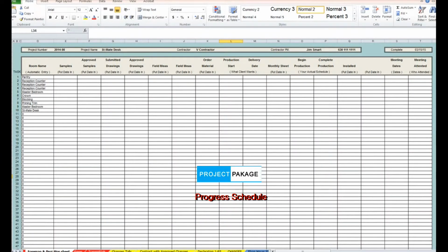Another sheet was a sheet that everybody in the office used, and it is called the progress schedule. This sheet is a chronological listing of everything that was received or submitted on the project. On Monday when we had our meetings, all the staff used this sheet, and it was nice because everybody knew where the project was, what needed to be done, and who needed to do it, and it was mentioned every time on every job that came up.